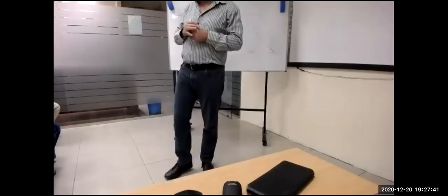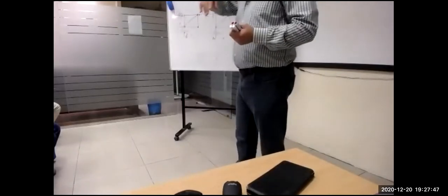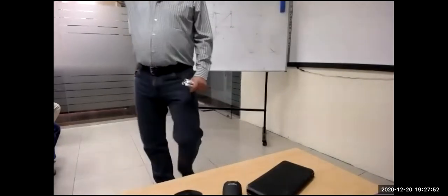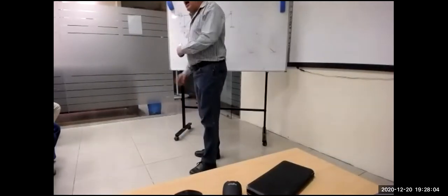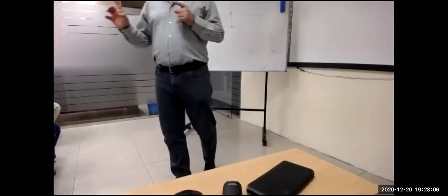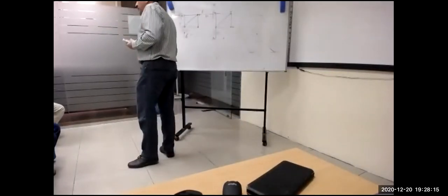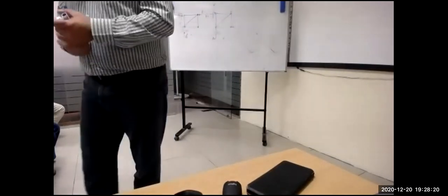Your critical path, when you submit your baseline program, it's already clear how many critical paths and everything. We have analysis for it and approval for it. In the end, we'll see, is this scope change coming in the critical path? Even if you update your program, what is the impact due to this scope change? Or is this impact coming in the critical path? If it comes, khalas. For sure, 100% you have extension of time. But if it's not in the critical path, khalas, I am happy. That means no time, but cost 100%. Cost 100%. Like number 7.